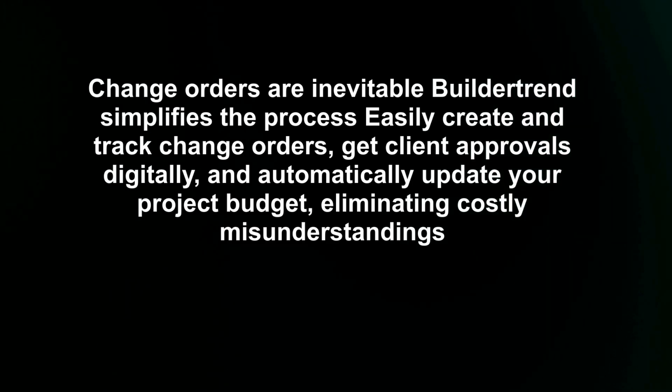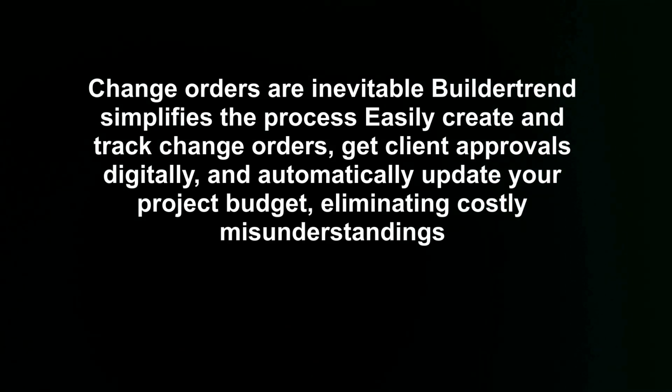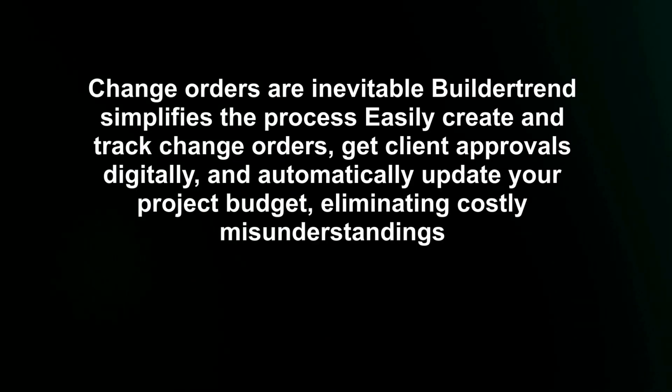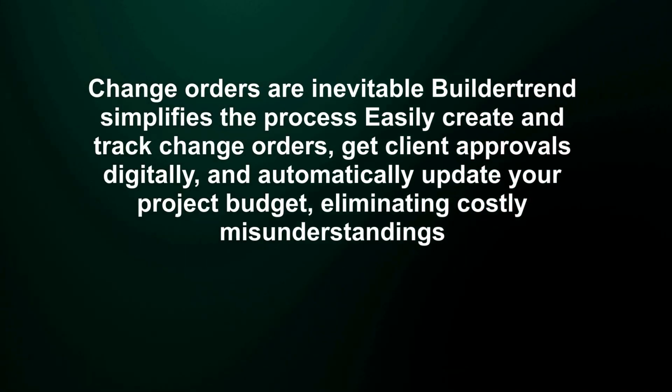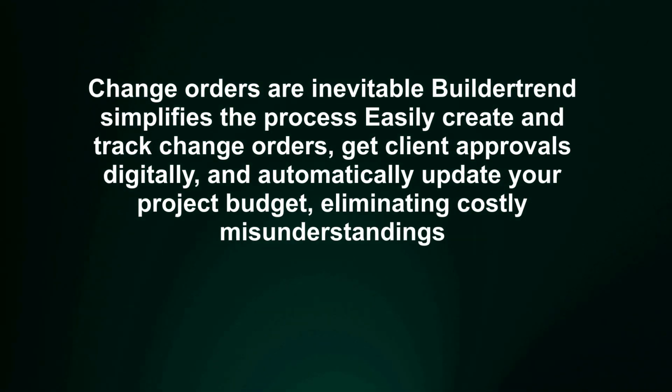Change orders are inevitable. Buildertrend simplifies the process. Easily create and track change orders, get client approvals digitally, and automatically update your project budget, eliminating costly misunderstandings.